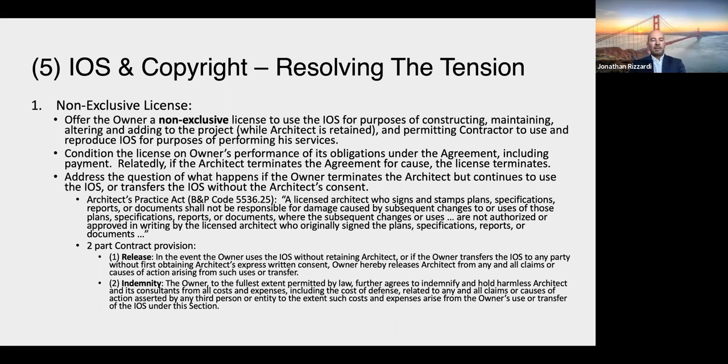You should absolutely get that, because it's only fair, and, at least as to the release, it's consistent with what the Practice Act says, and the provision is there. I think it also makes sense that the license be conditioned on the owner's performance, including payment under the agreement. So if the owner doesn't pay you, then the license expires. That's eminently reasonable.